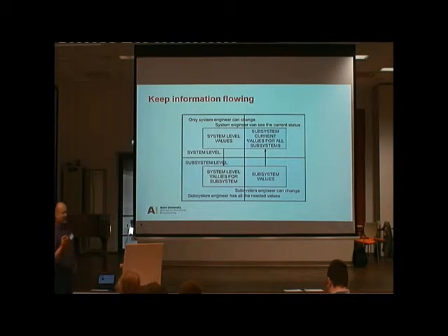That means he can see, okay, this radio thing is not converging. They should have 125 grams, but they're constantly at 150 and plus. So we should do something. So the system engineer can take measures in an early stage and say, okay, let's cut this from somewhere else and give these guys 30 grams and we can get the system going, because it seems like this is not possible to actually squeeze down.